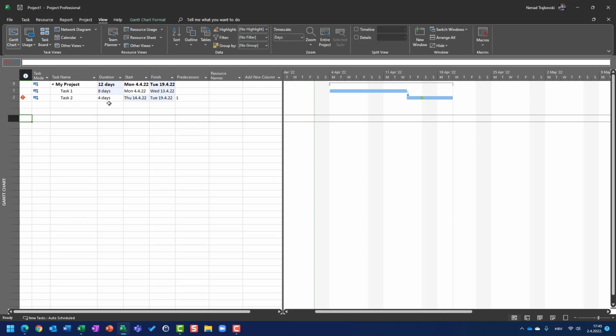So now I didn't break the finish to start relationship. I didn't break my schedule, but I missed the deadline. And I can clearly see here that the deadline was on the 15th of April, and now it is the 19th of April when it's supposed to be finished, and this deadline sign is here. Okay, it is not fine, I missed the deadline, but at least I know that I missed it.